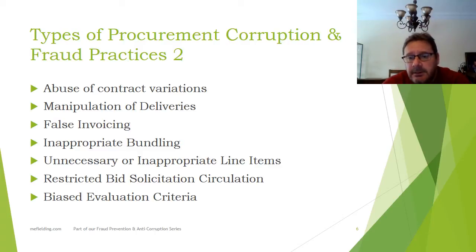Right, what happens when you have certainly things like technical skills, so the kind of contracts that we here at Emery Fielding are contracting for, is that they are judging us first of all on our technical proposals, and then secondly on our financial proposals. So we can still win a contract even if we're not the cheapest. And generally we don't try and bid too cheap just to win a contract. I mean, if we're really quiet or something, we might do that. Or if it's something new we want to get into. But in general, we won't do that.